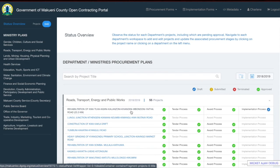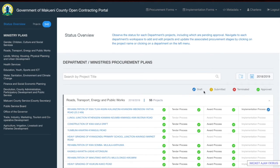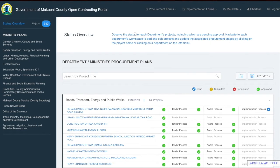This section allows you to view the different statuses for the different projects. The first status is draft, shown in blue — this means a form is saved as draft to be updated later before being submitted for approval. The second, in yellow, is submitted, meaning the form has been completed and submitted for approval by users with the approval role. The next, in red, is terminated, meaning the procurement process has been stopped at a particular point. The last, in green, means approved — the approver has reviewed and approved the form.